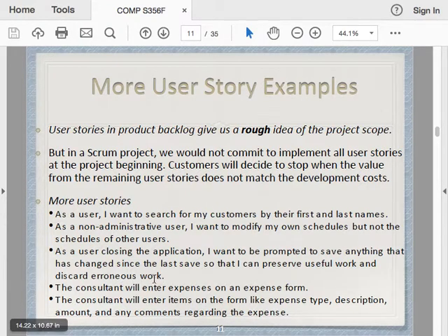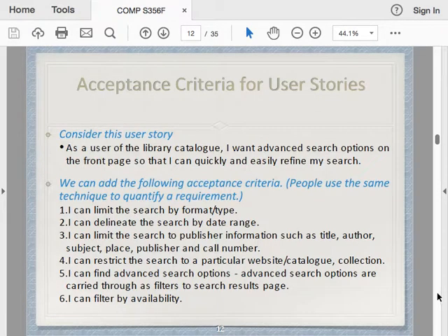And so these are some user stories that you can consider and study, but user stories are very brief. So it doesn't say enough of how to implement that feature for the customer, for the users. So what can we do? We have a term called acceptance criteria. Okay, so acceptance criteria are some additional information for each user story.